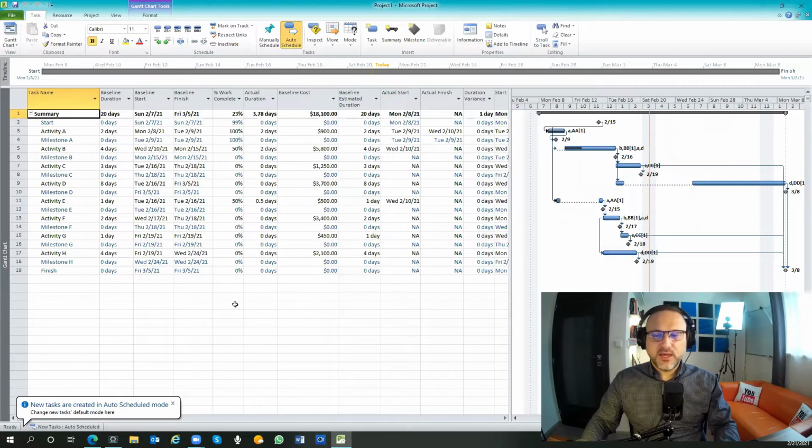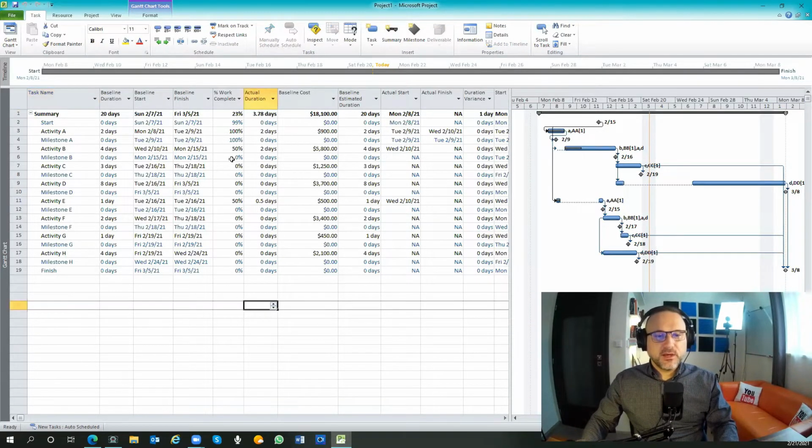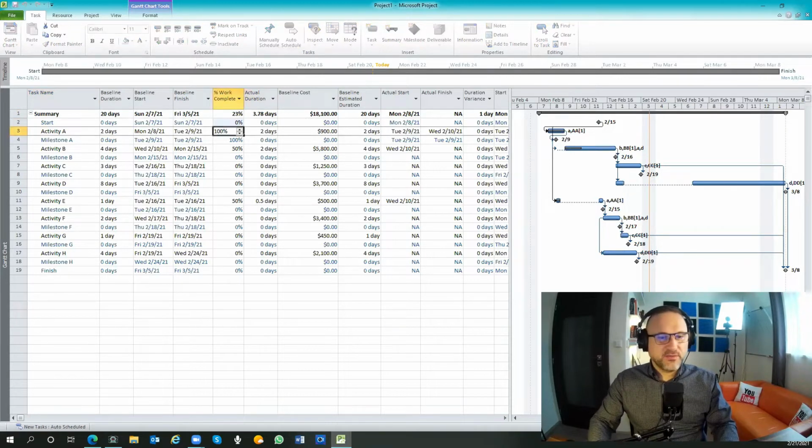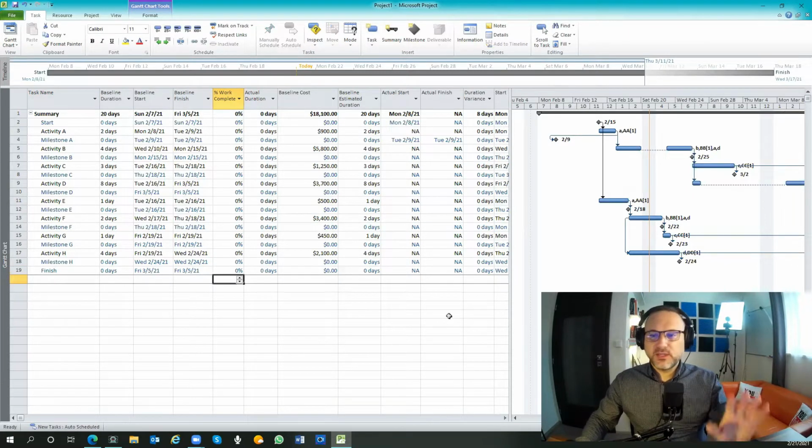Once you have created the baseline, you need to start reading the planned data from this Microsoft Project file. You will read the data, set it in a table, then start updating the progress and compare both. Very easy, very simple. We have everything at 0%. We haven't started the project yet. We set the project, had it approved, put the baseline, and now we will move onward.